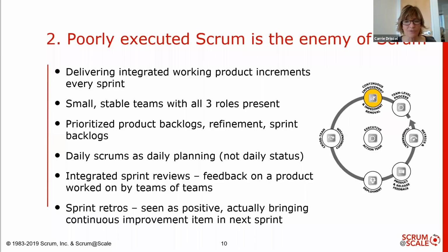Each compromise got them further and further away from the original Scrum DNA that made the pilot so very successful. So instead of small, stable teams, they now have 20 or more members, and some of them are only 25% dedicated to the actual work. Instead of experienced Scrum Masters, they have project managers / Scrum Masters required to play both roles.